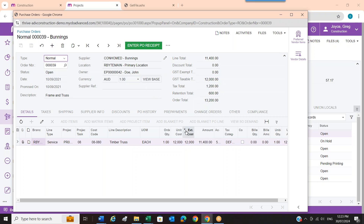Apologies — I apparently just lost my sound. Not quite sure where it went out, but I just showed a subcontract and now I'm showing a purchase order. When you put your purchase orders in, you can use inventory line items here as well if you have inventory — and there aren't many construction products that come with an inventory module. You can enter a PO receipt against the lines in the order, and then enter an invoice against it too.